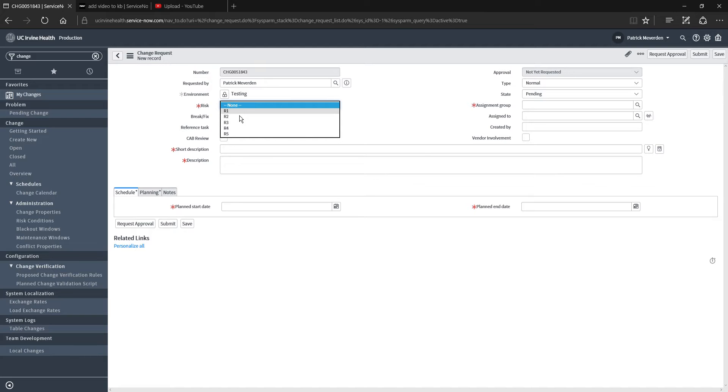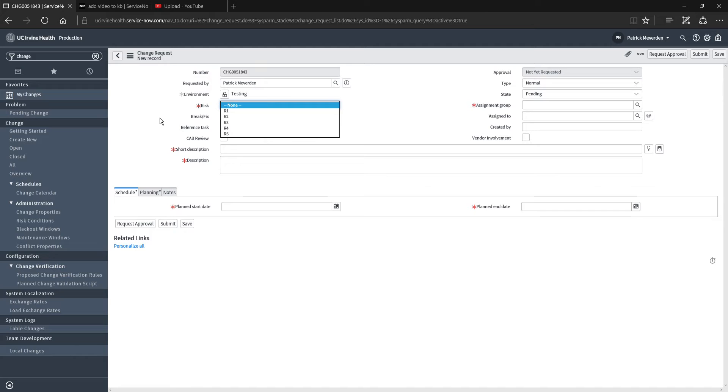Risk levels one, two, three, and four require not only team lead approval, but they also require a change advisory board or CAB approval. Risk level fives only require a team lead approval, and I'll walk you through that process in just a moment.